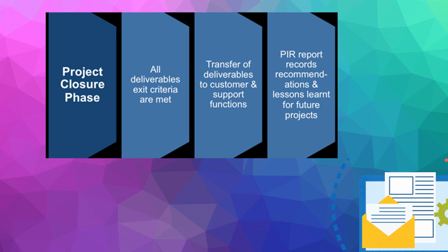So the emphasis here is on releasing the final deliverable to the customer or to the stakeholder or to whoever asked you to do the project. And you hand over the project documentation to the business or to me in our case, and you terminate supplier contracts if in case there are contracts, releasing project resources, and communicating the closure of the project to all stakeholders.